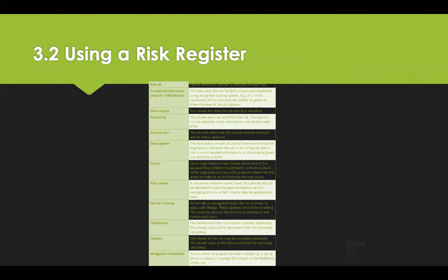It can be held at board level, functional level, or project level. It should be initiated as soon as new products are being designed and updated, and as suppliers are being considered and as risks are being identified. The risk register should be reviewed on a regular basis.